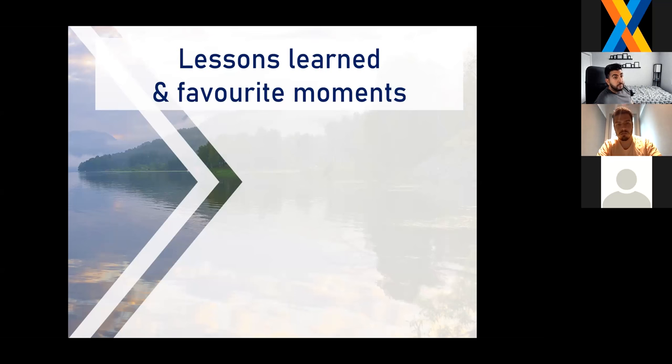I can do that. So for my lesson learned on this project, the big thing I took away is learning how to do vertical slicing properly, and it's something I've taken forward into my work with the wildfires team. When we started building the Invasives BC application, I have the feeling that we went too deep too fast, rather than figuring out how the observation, the treatment, and the monitoring records all worked with each other, and understanding that at a very basic level without all of the variables that were present. As a Scrum Master, I think that's my biggest regret on the team, that I didn't push back there to keep the team moving forward through that workflow.